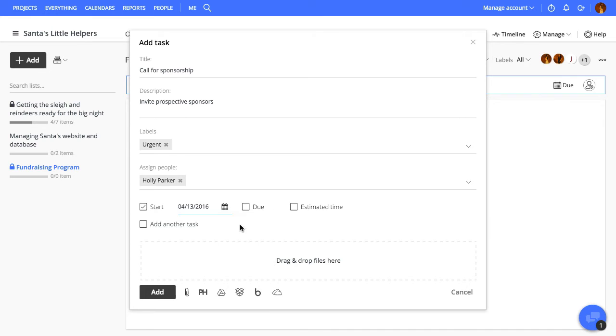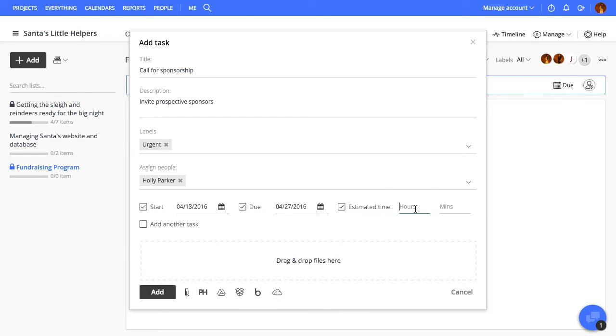Give it a start and end date and enter estimated hours. You can also attach files from your computer or from third-party sources.